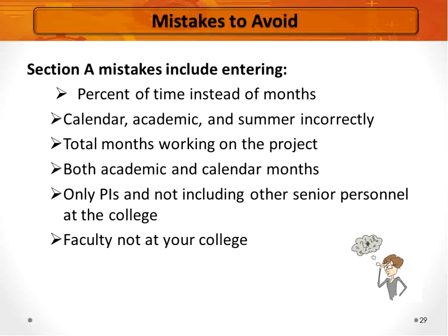One thing that worked for me with my first ATE award was that my full academic salary was taken care of. I asked for 2 months of summer support, and that worked just fine. I was really only asking for the support over the 9 academic months that was the contract number, even though I was paid over 10 months, and then the 2 summer months. One thing NSF does not allow us to do is, let's say you're paid over those 9 months, and there's 3 months where you're not doing anything. You can't ask for 3 months of summer support. NSF figures that everybody needs a vacation, so you can only request 2 months of summer support.